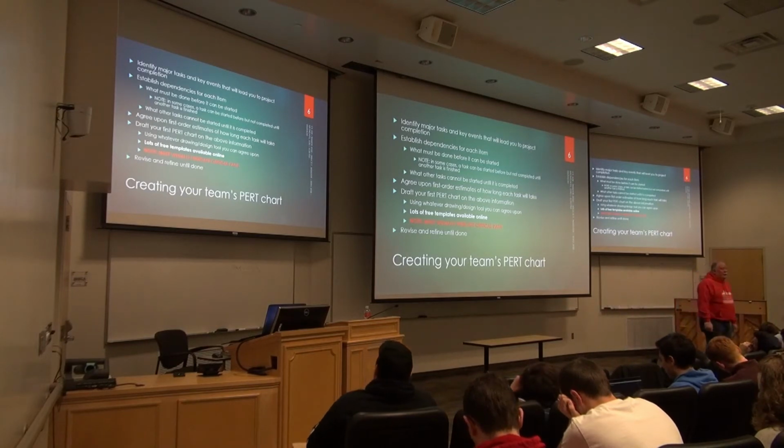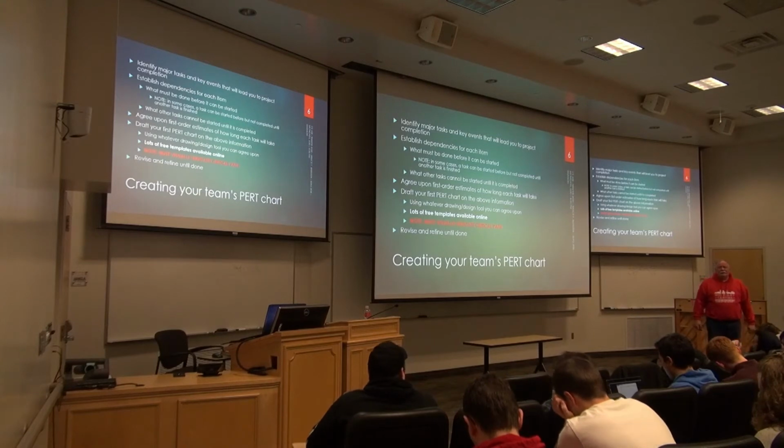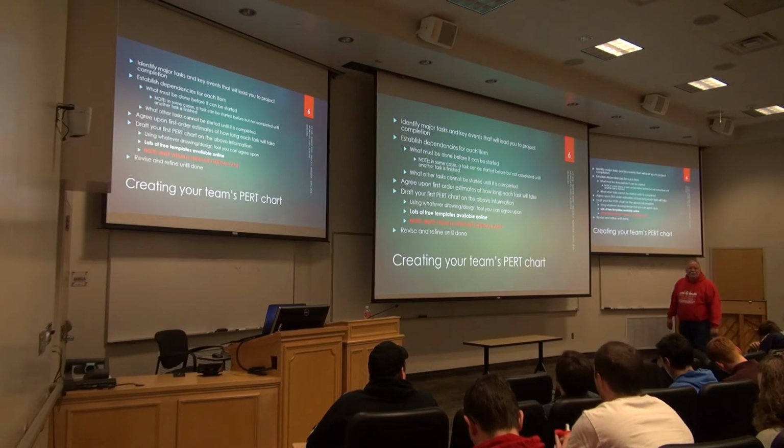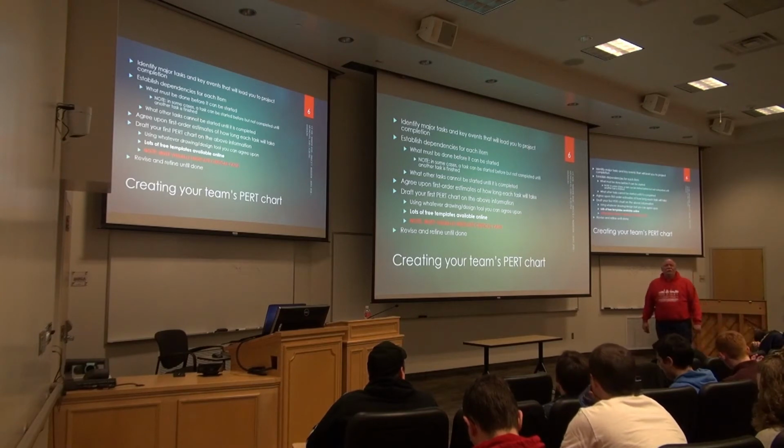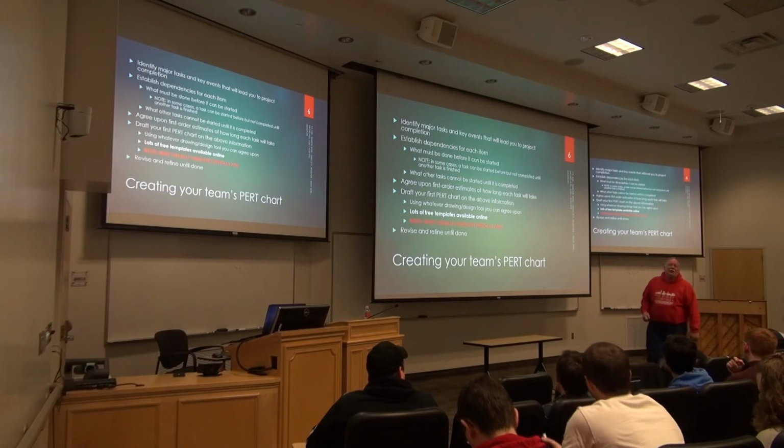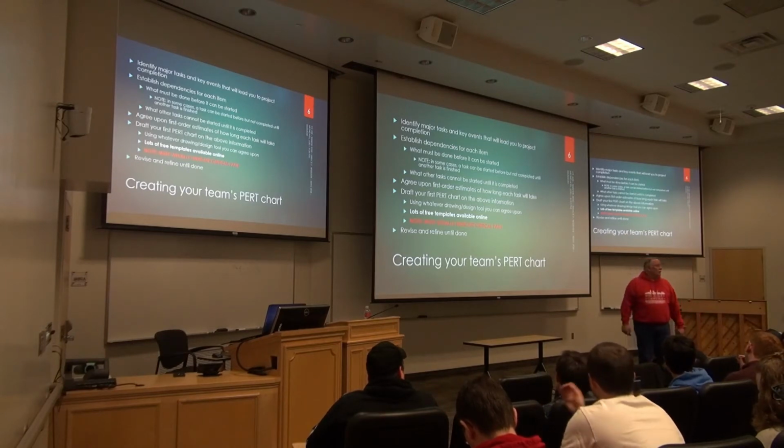And then, over the next 6 weeks, you're going to have to adjust that when you say, we didn't get this done. This is the impact on the schedule, therefore this is what we have to drop in order, this is how we have to scale back our anticipation for Demo 1 and Demo 2 accordingly.